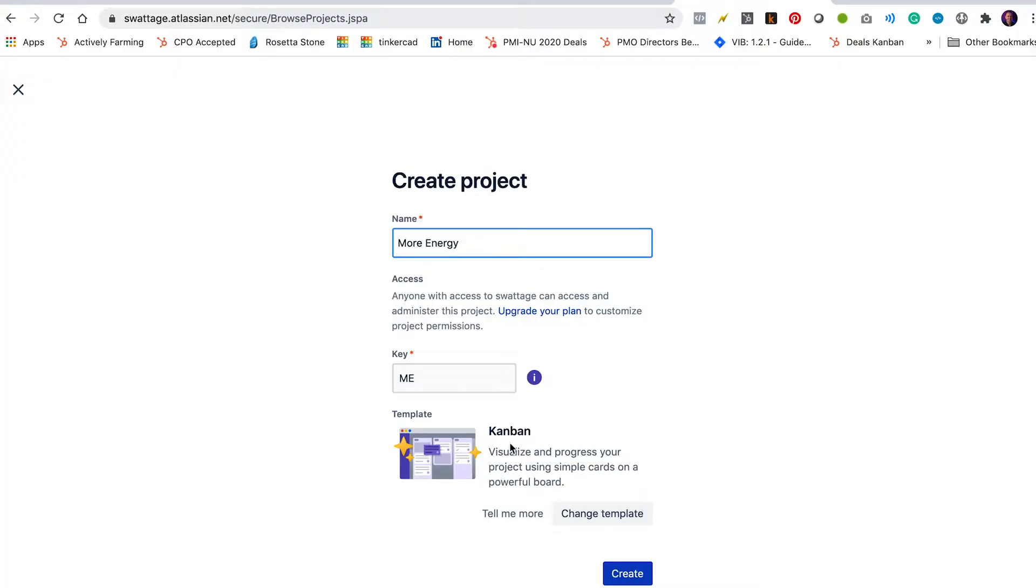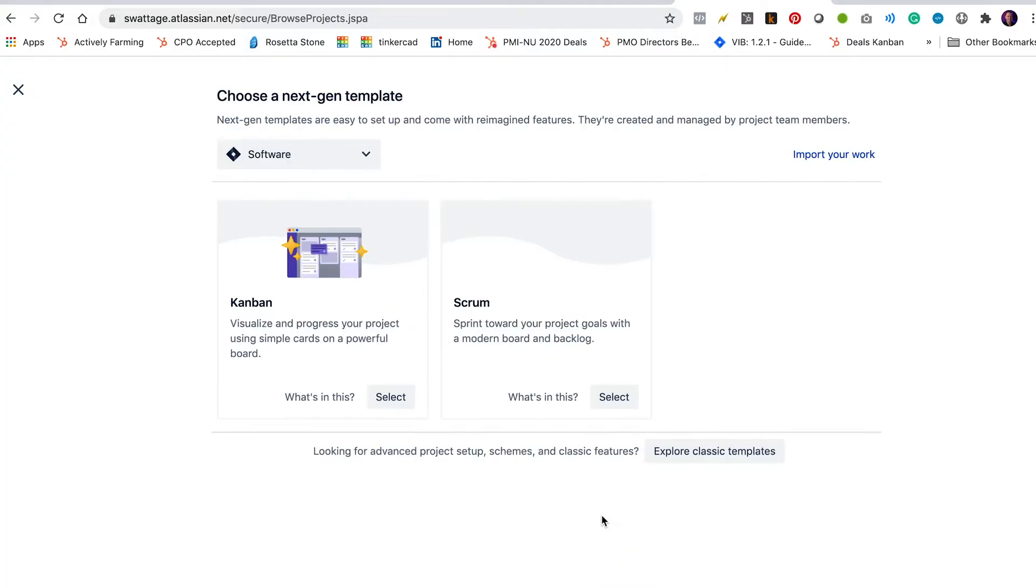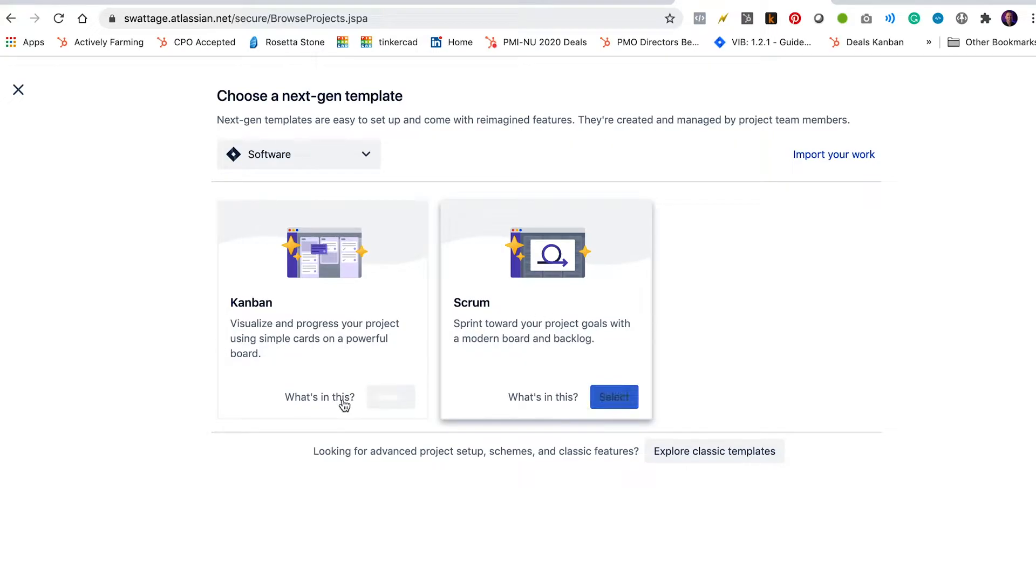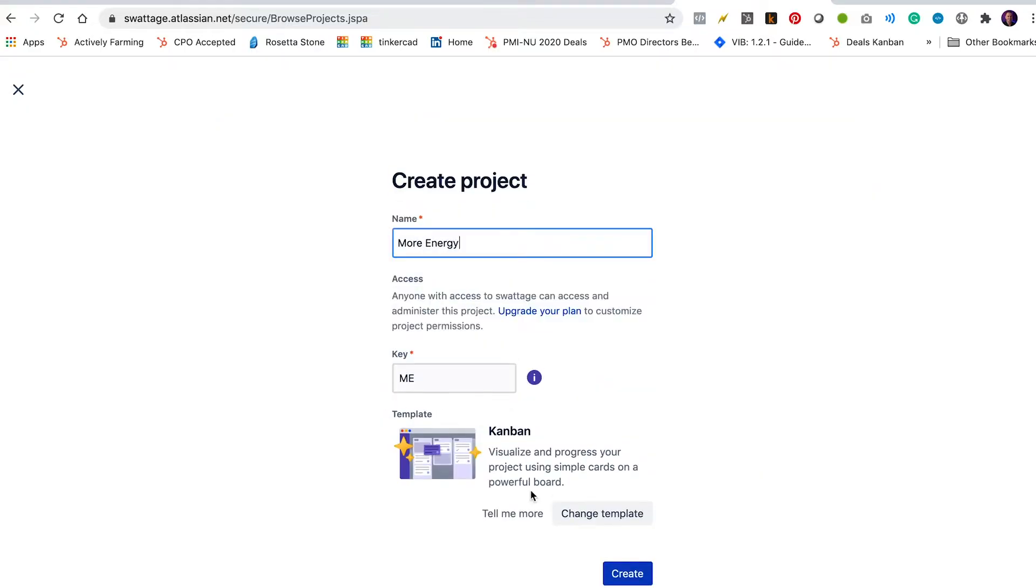Notice that down here there's this place where it says template and it says Kanban. And so it's basically saying how do you want to format the project so you can manage your work. You can use Kanban, that's what we're going to do. You can though change the template if you want. You can select Kanban or Scrum. Scrum is more if you're working in sprints and a backlog. But we're going to go ahead and stick with Kanban. All right, we're going to click create.